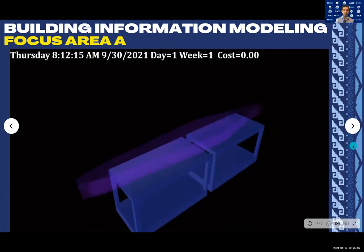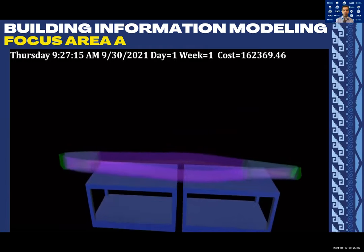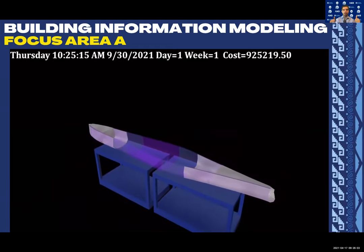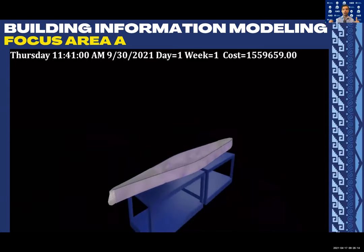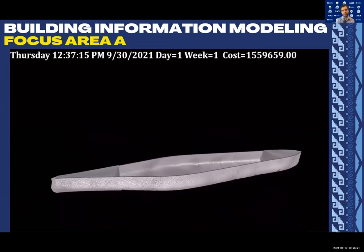As a result of having to move remotely, it was decided to incorporate a full BIM 5D model of the canoe, which will assemble every part of the project in one place. For instance, this will let each member of the team access all the data, making it easier to verify and integrate the elements before the construction is completed, reducing the risk of discrepancies, mistakes, and material waste. Equally important, by adding time and cost to the model, it will become easier to train our casting day staff, and it could be used for future canoes as a template.